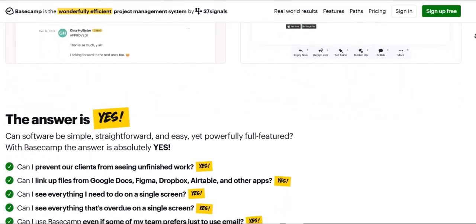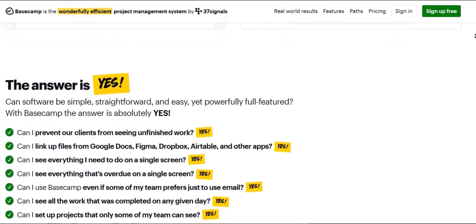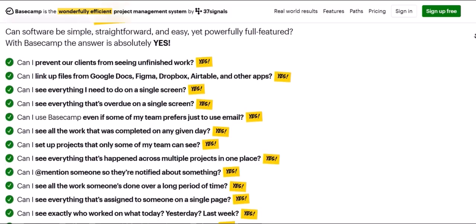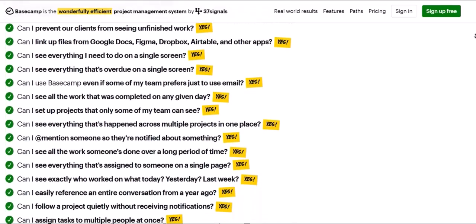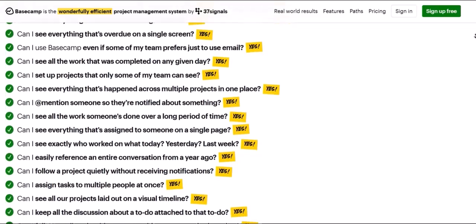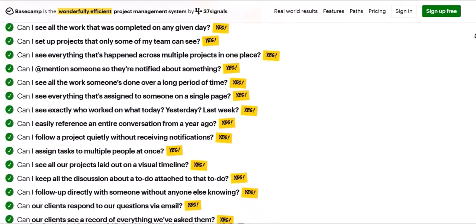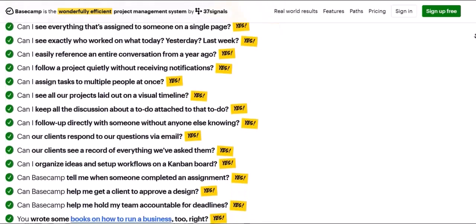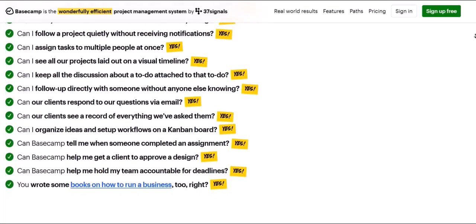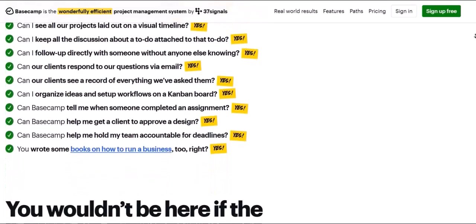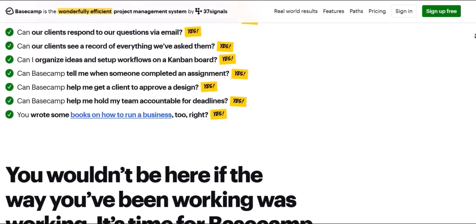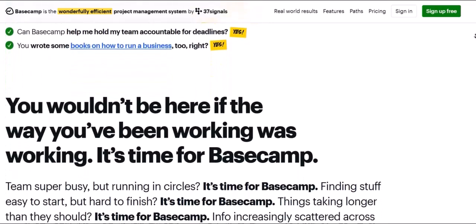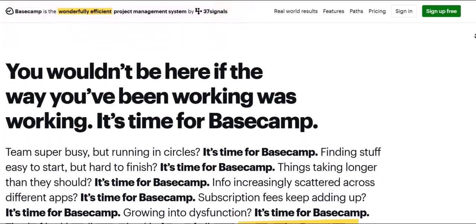A client workspace in Basecamp is specifically designed for working with external parties. Each client gets their own dedicated space, and within that space, you manage the projects you're working on for that specific client. How does it group projects? If you have Client A, Client B, and Client C, you'd create a separate client workspace for each. Inside Client A's workspace, you might have projects like Website Redesign Phase 1, SEO Audit, and Social Media Management. All these projects are inherently grouped under Client A.